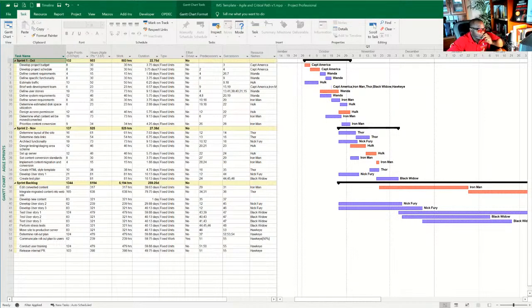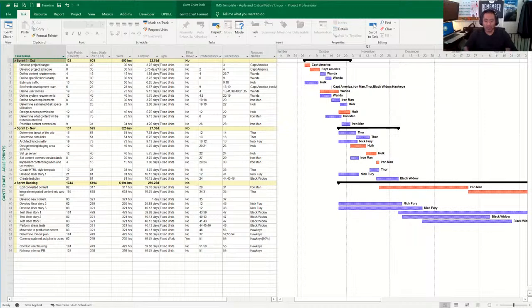So I'm building an IMS, an integrated master schedule, which is the main term for schedulers and schedules that DoD uses to publish the amount of work being done and how it's planned and measured against the actual work.